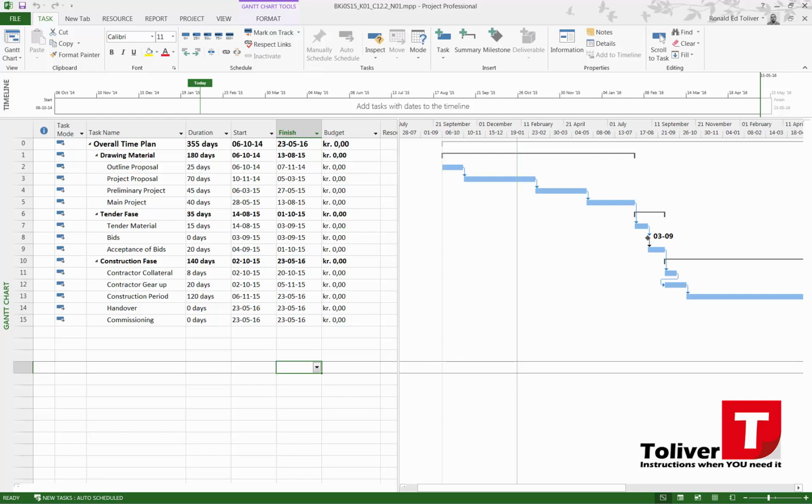The way that I calculate my budget right now is the most common form of fee for design of general construction projects: fees based on construction cost. The fee is normally split corresponding to the 5 stages, and again, those were the 5 stages based on the description of service, chapter 3. Normally, you'd get 25% for the outline proposal, 25 or 20% for the project proposal, 15 for the preliminary, 25 for the main project, and then 15 for the project follow-up.